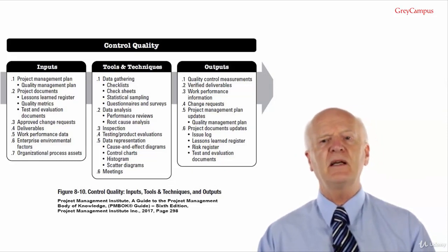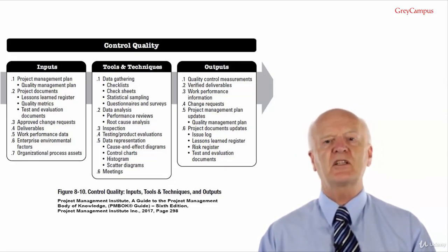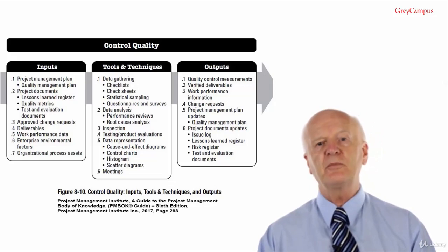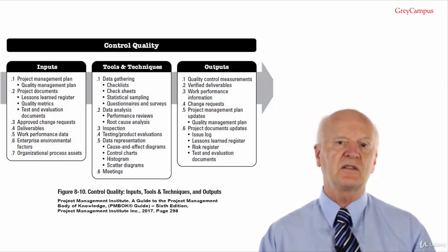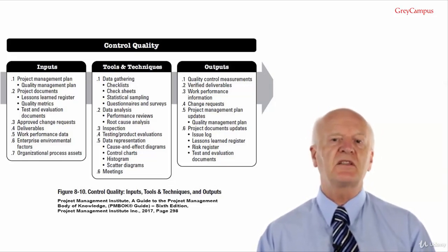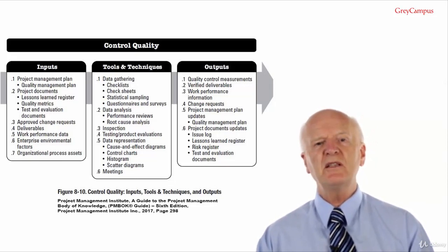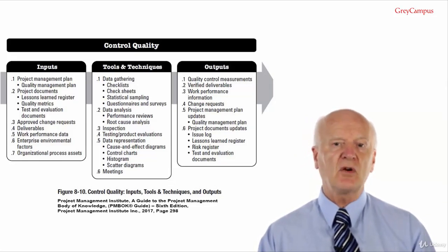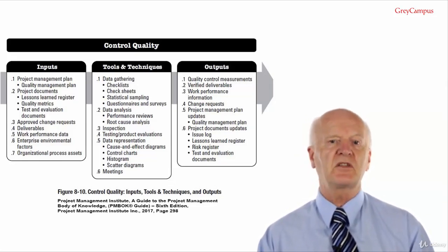Or to put it another way, imagine we have a customer satisfaction process. The input is questionnaire results, the tools and techniques is the survey, and the output is knowledge of customer satisfaction. The cost regarding defects identified in the surveys may be considered external failure costs to the cost of quality model and have an extensive cost implication for the organisation.